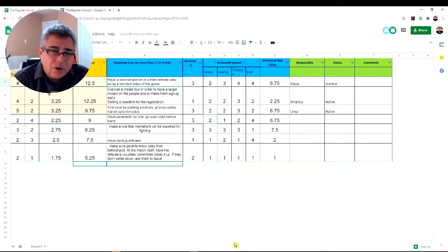Actually, what I always do, that's my way of doing it: when I'm executing the project, every week by Wednesday, I try to understand what activities will be starting in the following week. And I try to see if there is any active risk for those activities. Actually, I look at all the activities and do a small risk assessment on all the activities of the following week, so I can review the risks and review the activity.